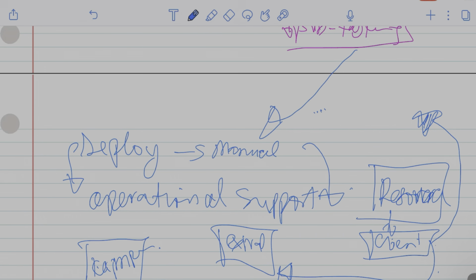It's the same as when you can be asked at the end of the sprint, we want your sprint report. That's just a note. It's just a note to say, okay, this is exactly what happened. We're able to do this and this. This is what happened and all of that. Also, release is not the same as deployment. Deployment is about moving from one environment to another, which might not necessarily go out. Release simply means that you've completed the work and it's now ready for the market. So those are the two different things.